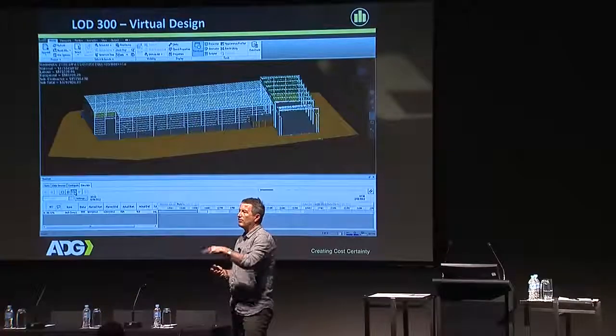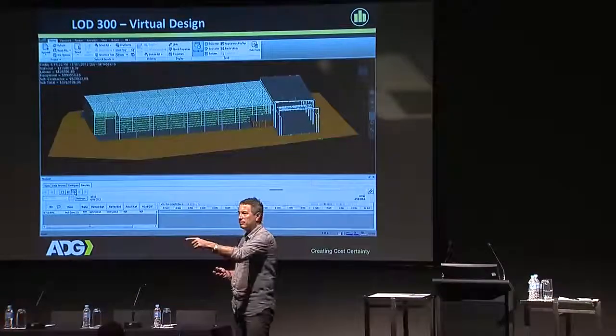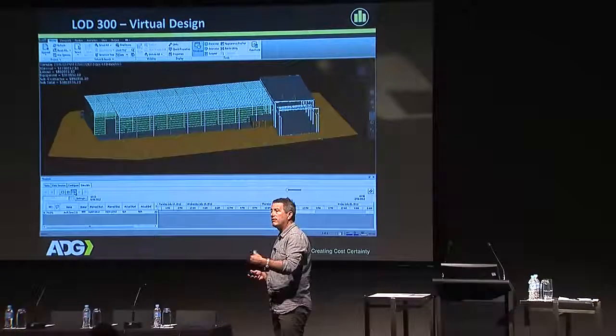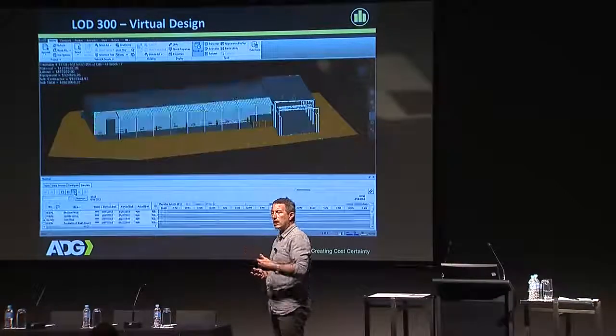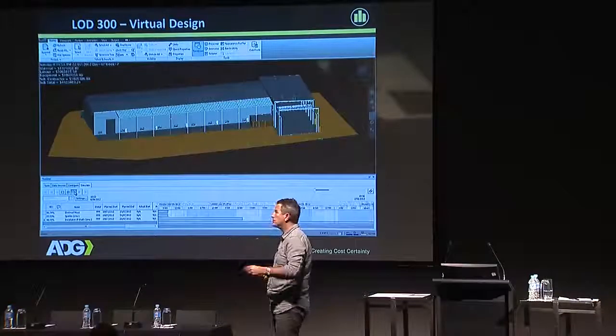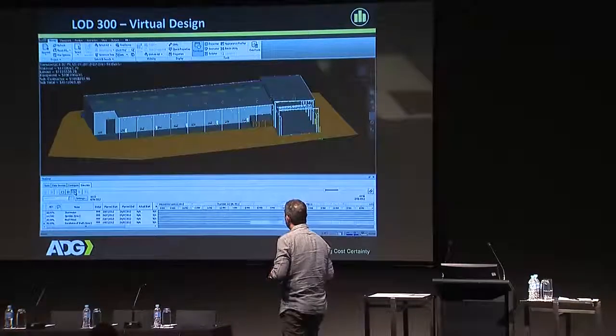What isn't known is what the actual quantity of work is in each one of those activities. And this is something that we learnt that we could do very strongly when we start to marry activities together with quantities rather than the actual time period itself.